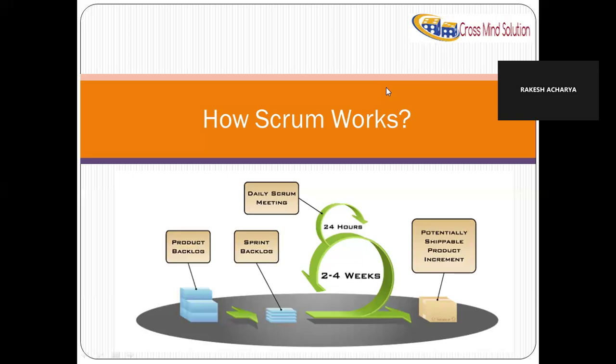See what is happening. Sometimes support projects are getting tickets. They will not wait for 2 weeks to complete their ticket resolution, right? They are doing frequent releases. So they will take, okay, these 50 tickets I have to complete within 1 week, so they will take the sprint cycle as 1 week. Okay.